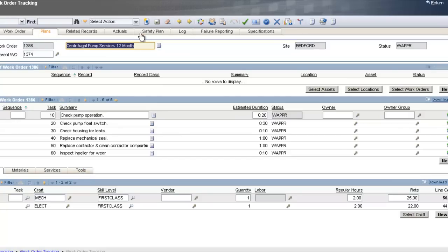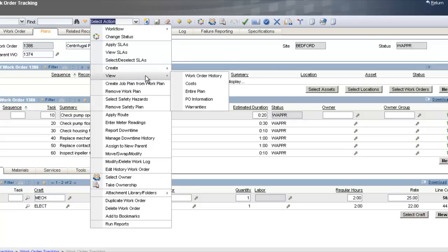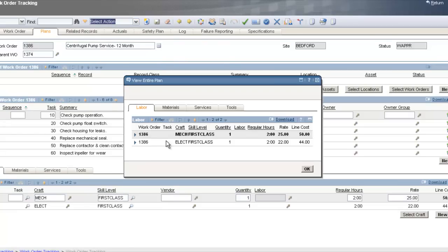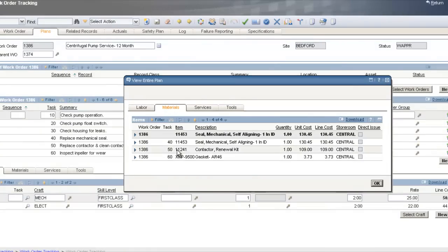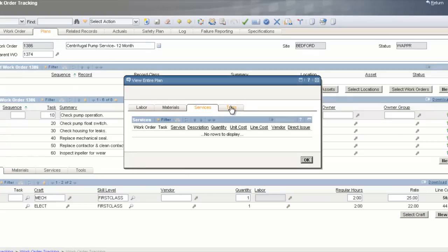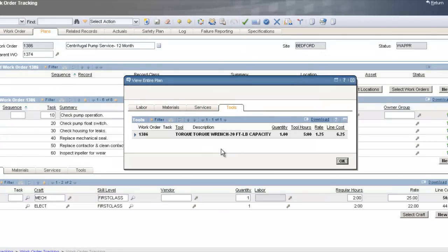At this lowest level, click on Select Actions, View, and Entire Plan. This shows at a glance all the labor needed for this one job plan. Clicking on the Materials tab shows all materials required and what steps they go to. Services shows any standard services, and under Tools I can see what tools are needed — in this case, a torque wrench.